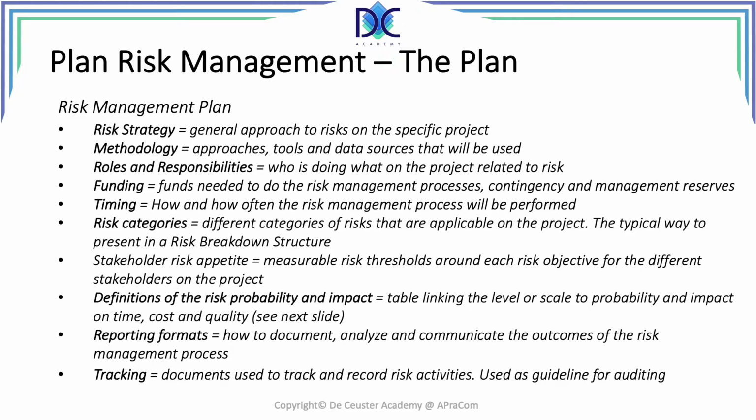We look at roles and responsibilities, who is doing what on the project related to risk. It may be the project manager, but for very large projects, you may have, in fact, a risk manager who will be looking after the risk aspects of the project. We need funding, so we look at contingency reserves. We also may have a look at management reserves, but management reserves are typically for management decisions and not necessarily related to risks.